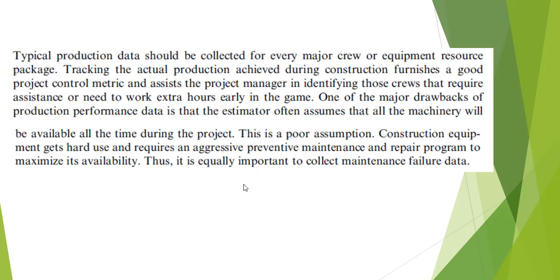And if you go into a model assuming all the machinery will be available all the time, that certainly isn't a proper assumption in terms of real-life situations. And if you don't have aggressive preventive maintenance and repair programs to maximize its availability, you won't have confidence that this could be the case.